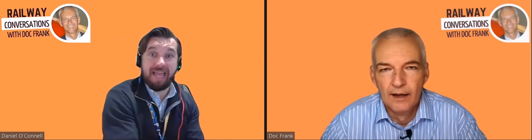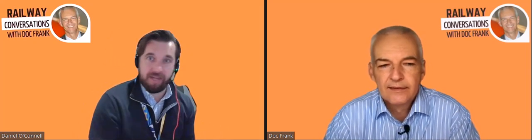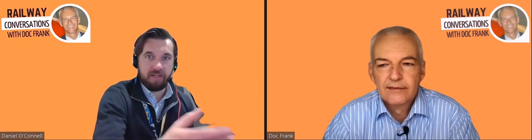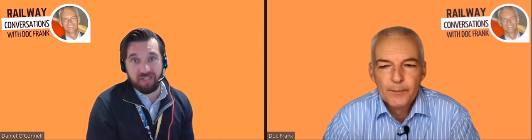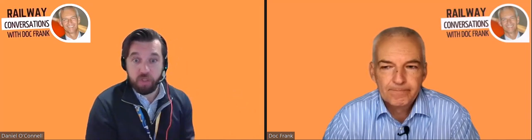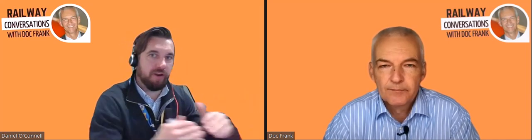We can test it, as I said, in a factory. We can test it in a lab, yeah? However, the real interface is when you put the three systems next to each other. So that could be the train, yeah, PSD and signaling. Best locations for that predominantly are in test tracks, yeah? You can de-risk that activity and these issues and fine-tune it before it comes to the tunnel.